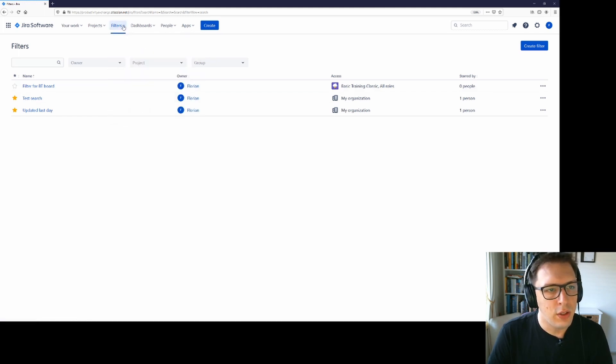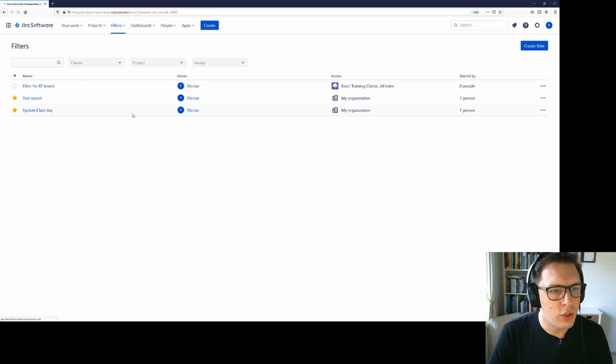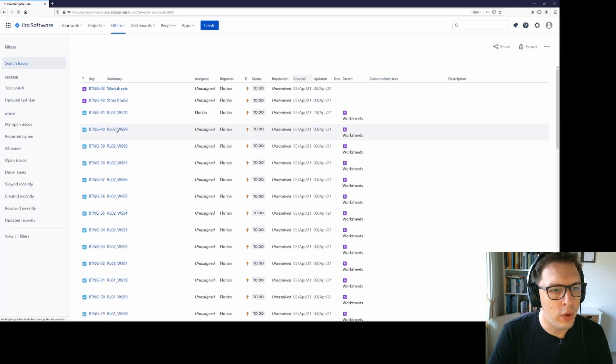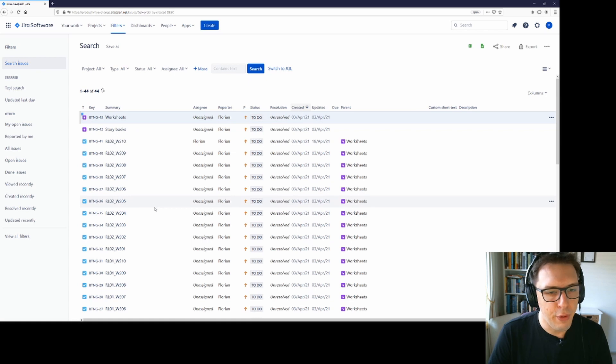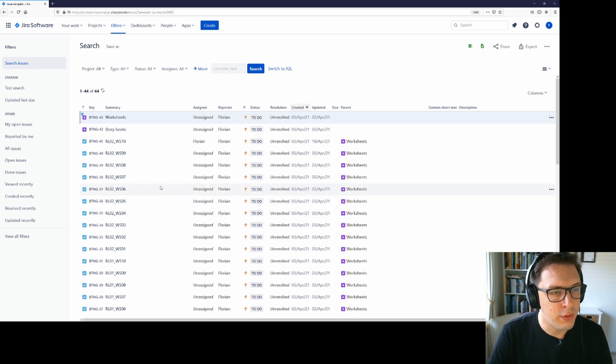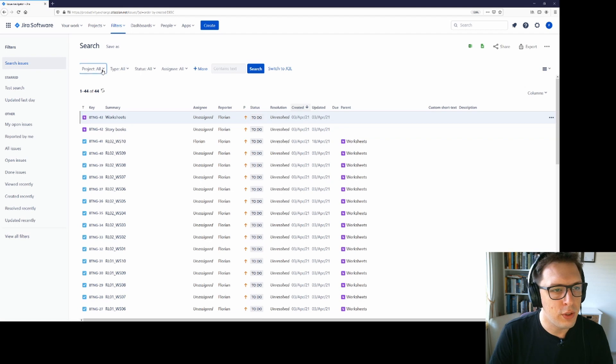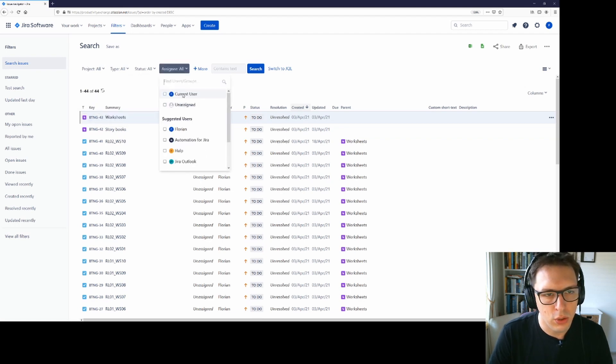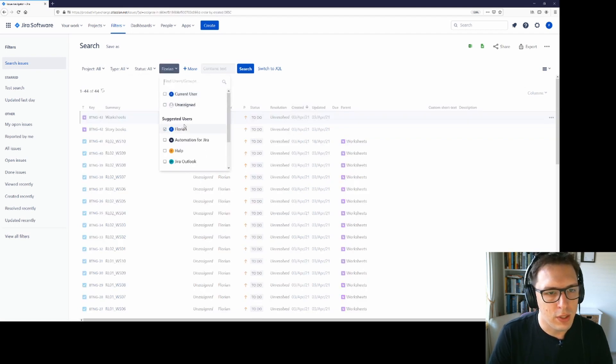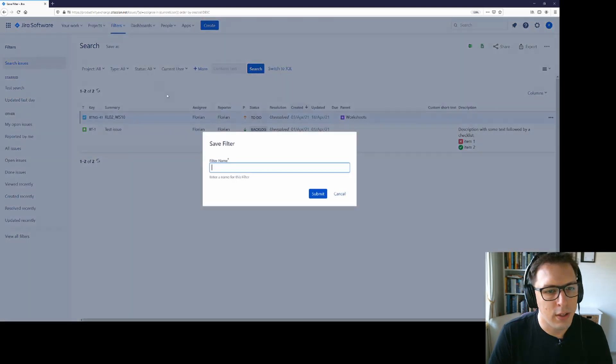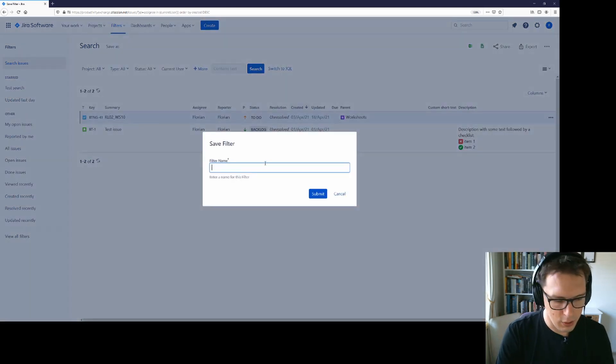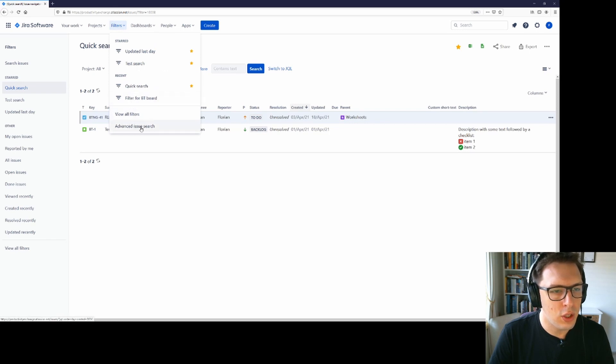All right. And now to the trick. So advanced issue search will always be quite slow because it's loading everything from every project. If you're finding that that's an inordinate amount of time, what you can do is you can save yourself a little filter that just returns one or two issues. So in my case, what I might do is I might just save myself current user and then save that as something like quick search. And then whenever I come into the advanced issue search, instead of clicking here, what I can do is I can click on quick search and it will open significantly faster.